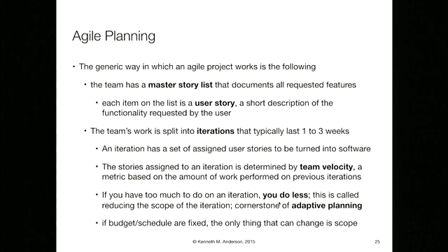And your customer is right there. You can start talking to them to try to figure out, here's what's happening, here's why this is going on. There's nothing that's going to make us suddenly do 40 more points in this iteration. So you do less. This is called reducing the scope of the iteration, and it's the cornerstone of adaptive planning, which is what this tries to be. Now, I'm not talking about all the iterations that go into this. I'm not talking about iteration debriefs or when and where you do your planning, your estimating, all that kind of stuff. We'll get to that in a subsequent lecture. But this is the key point. If the budget and schedule are fixed, the only thing that can change is the scope of what you're doing. And you scope it back until you can deliver something that's of high quality and was things that your user wanted. Now, there are things you're leaving on the table, unfortunately, but at least everything that gets delivered is of high quality and were things that the user wanted.